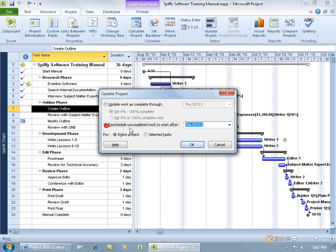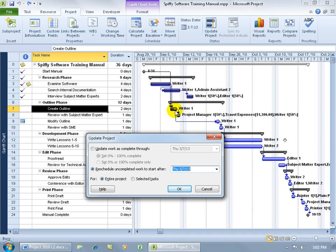We're going to be rescheduling uncompleted work, which is only this task right here, to start after - let me type in the date - 9/9/10.